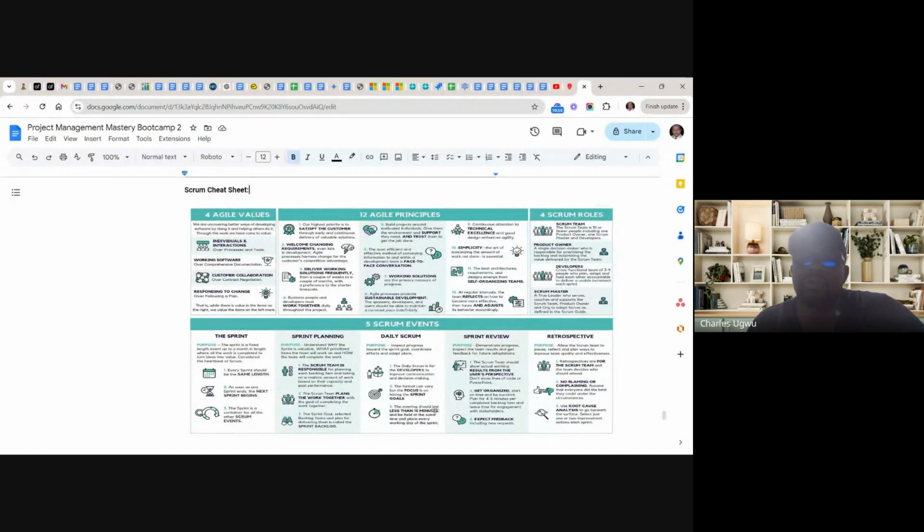The meeting should last not more than 15 minutes. We call it a time box. I want you to understand this word, time box. They use it a lot. It's just one of their terminologies, time box.